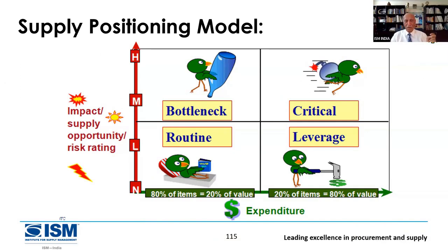Now, the way I did it long back when I was research and development head: no risk means I got 8 or 10 suppliers. L means low risk, I said, got 4 suppliers. 3 suppliers means more risk, medium risk, and H means 1 or 2. If I got only 1 or 2 suppliers, my risk is high. So now you can see around how it works.